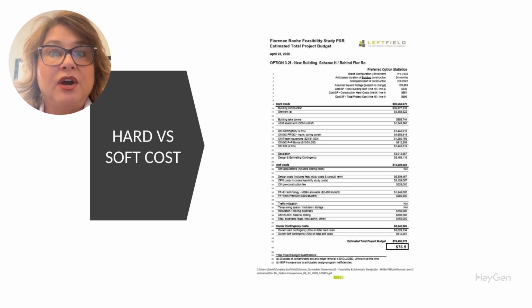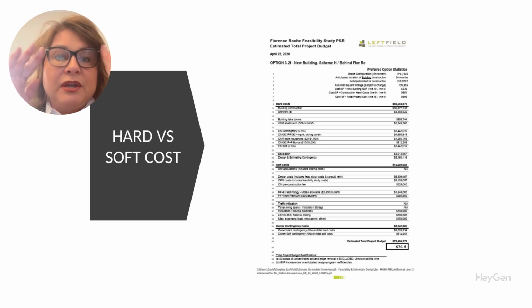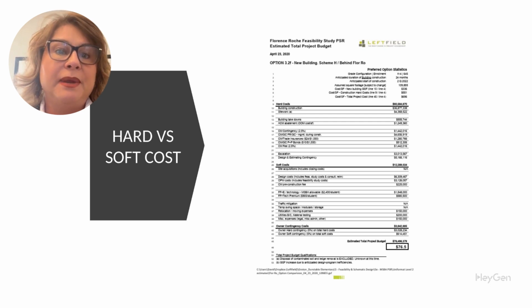Now let's dive into the hard costs, which total just over $60.6 million. These are the direct construction costs you'd find in the GMP or bid package. $36.9 million for the main building construction. This includes the core and shell, interior finishes, systems, and structural elements. $4.4 million is allocated for site work, grading, paving, and utilities. $555,000 is budgeted for demolition of old structures. $125 million is included for abatement of asbestos-containing materials, which is a required safety measure before demolition.